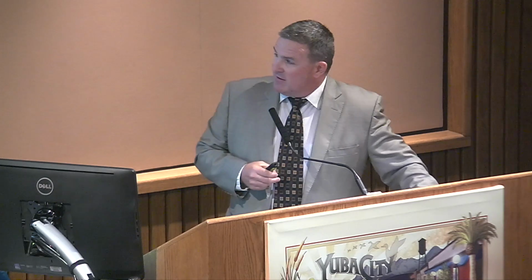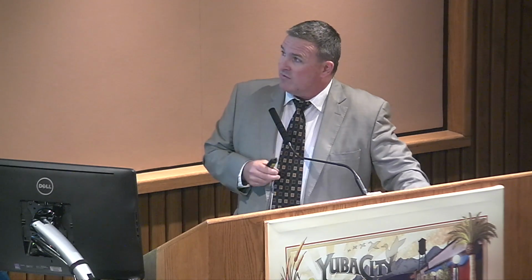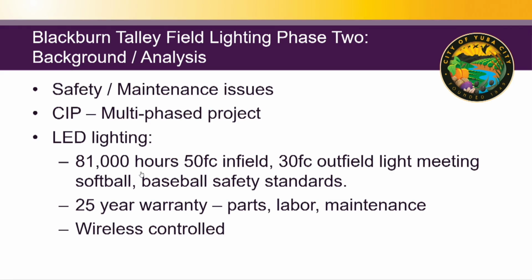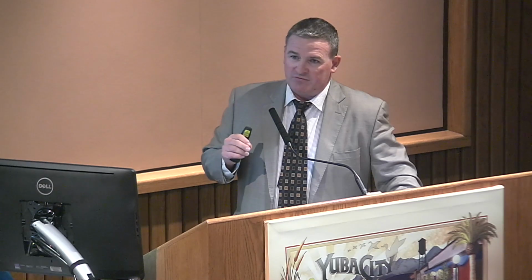When we looked at the project, it's expensive, so we thought the best approach would be a multi-phase implementation through the CIP. We broke it into a three-phased approach, where the first phase was completed a couple years ago. With that, we went with an LED lighting system, Musco lights, which is pretty much the standard for field complex lighting, providing a 50-foot candle outfield and 30-foot candle infield consistently. It has a 25-year warranty, which is really huge when comparing the others, covering maintenance, material, and labor, and they monitor it and take care of it for that 25-year period.